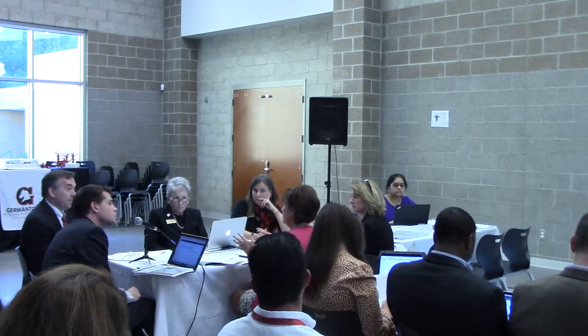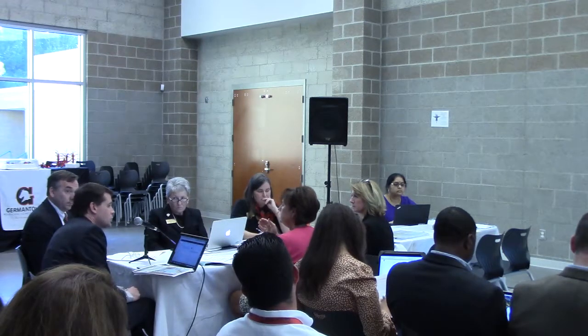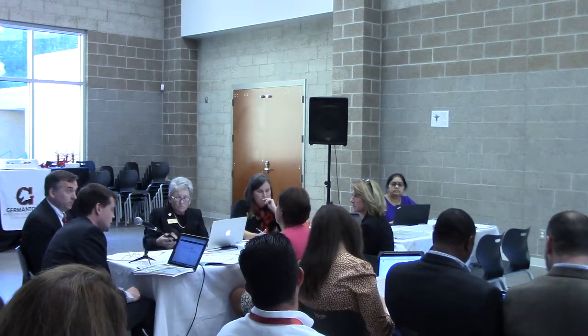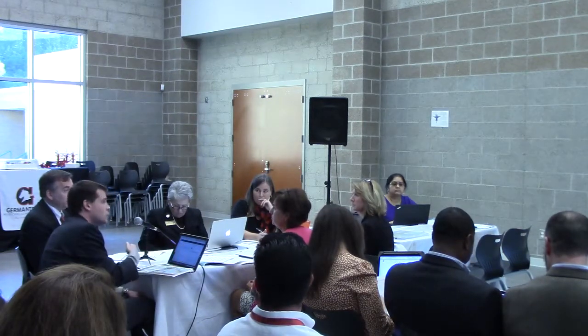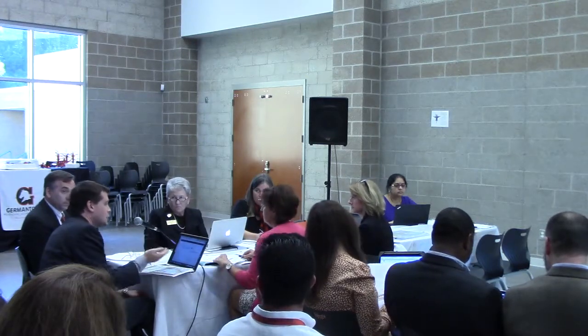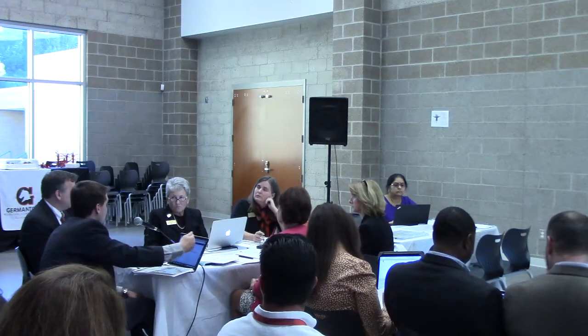And on there, it had a part 1A, 1B. That's all included in the first scope of work for $22,500. It said get additional bids, but that is included in that piece. And in a perfect world, they go out, fundraise, everything goes wonderful, this happens, and the district's not out any funds. But I do want to make you aware, approving this contract is basically giving them approval to go through step one and then stop.